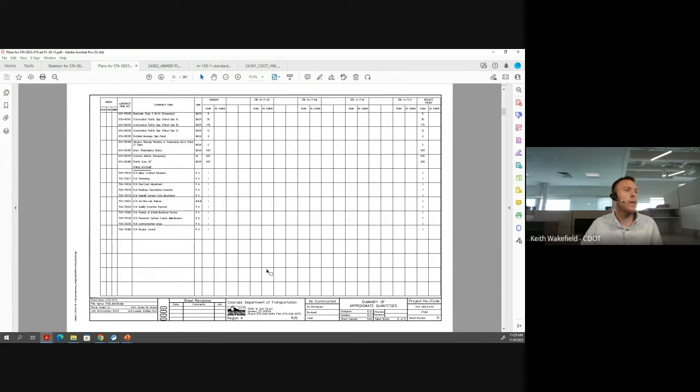That was fantastic. Oh, and then one thing to add, at the end of our contracts, we have these force account items. Force account is not biddable. It's a specific pool of money that we put aside, saying that we anticipate they might spend additional money on, let's say, for example, communication lines, but we don't really know what that scope is going to be. So we put, let's say, $5,000 aside for that.